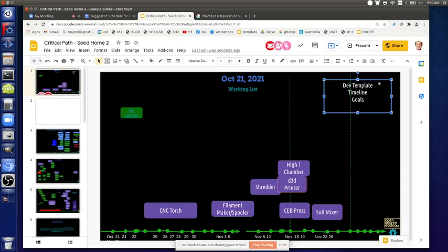So the question I think we all have is: is there an alternative to making the blades using the torch table? Is there going to be bulkier blades? Yeah, we can. There's a cost, and we don't really have a budget. The budget allotted for that was like $500 for the steel if we do our own cutting. If you're going to get this cut by somebody, I would expect it'll probably be like $3,000 or so. We can check on a quote, but these things ain't cheap once you start getting people to cut a bunch of steel. There's a lot of steel there, actually. The blades themselves are going to be like 500 pounds by themselves for the amount of blades we wanted to put in there.